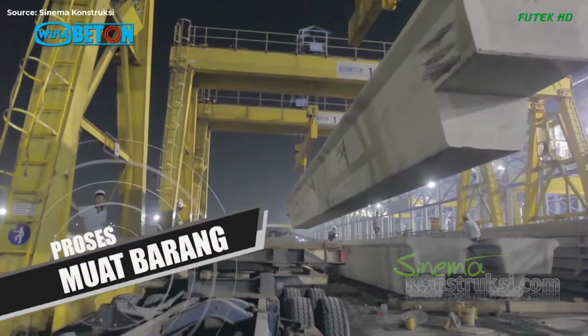Precast beams are manufactured in a controlled factory environment, ensuring consistent quality and reducing the impact of adverse weather conditions on the construction schedule. This method allowed the Cipali Toll Road project to progress rapidly, with the installation of precast beams being a streamlined process compared to traditional in-situ concrete pouring.